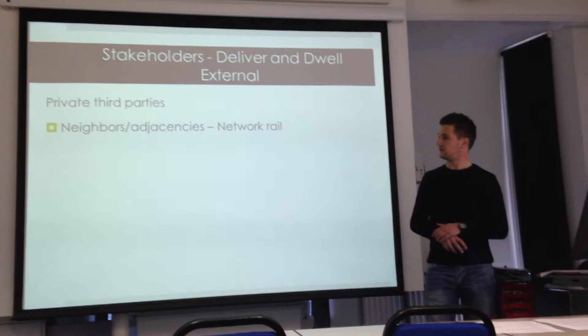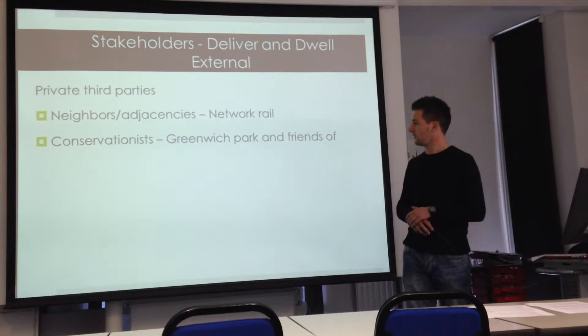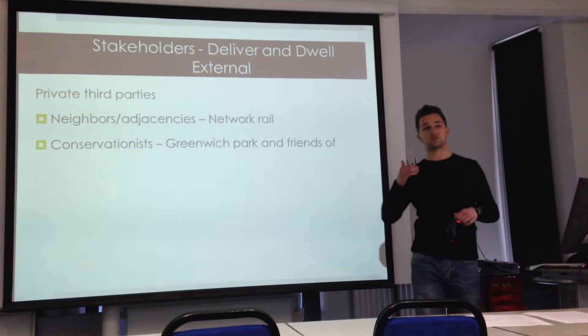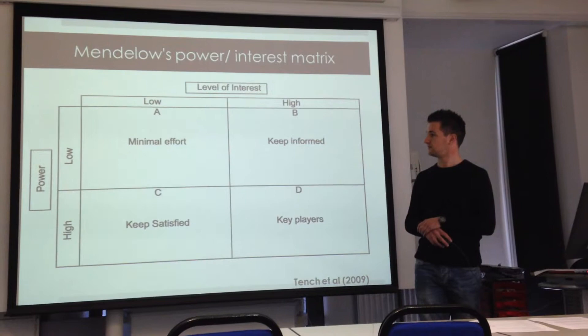Private third parties include neighbours — Network Rail is directly adjacent to the site and there have been a few issues with them, though these are now resolved. Conservationists include Greenwich Park and Friends of Greenwich Park. The site is quite close to the park, so the building must be in keeping, and there are listed buildings to the back of the site, so conservationists remain a key stakeholder at this stage.